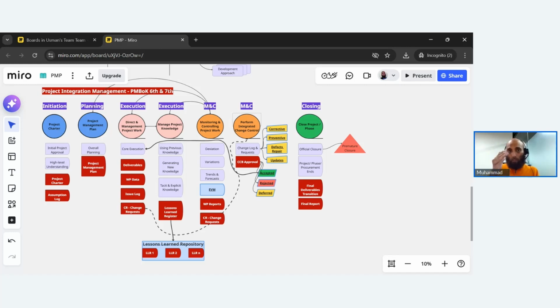If you look at the matrix in the PMBOK 6th edition, it outlines the planning column, which has the planning for schedule management, cost management, risk management, and all of the knowledge areas. So you are performing the planning for all of those knowledge areas, taking their outputs and using them as inputs for the project management plan creation. For example, you create the requirements management plan, scope management plan, scope baseline, schedule management plan, schedule baseline, risk management plan, and resources management plan. So you basically create all of those documents and baselines.